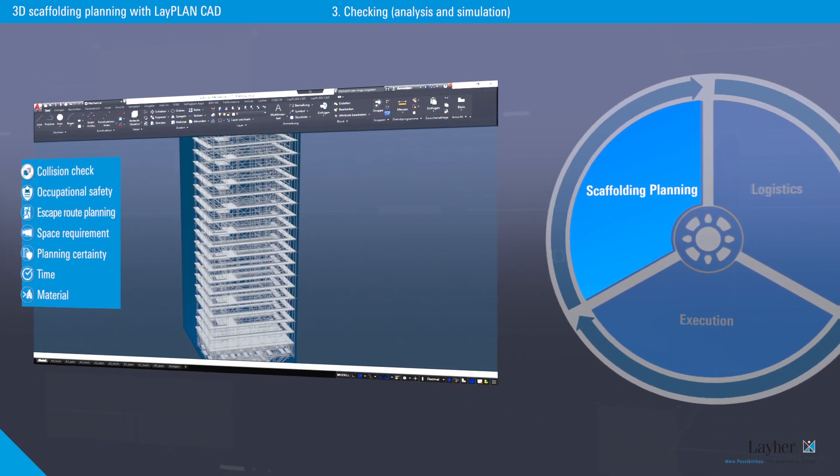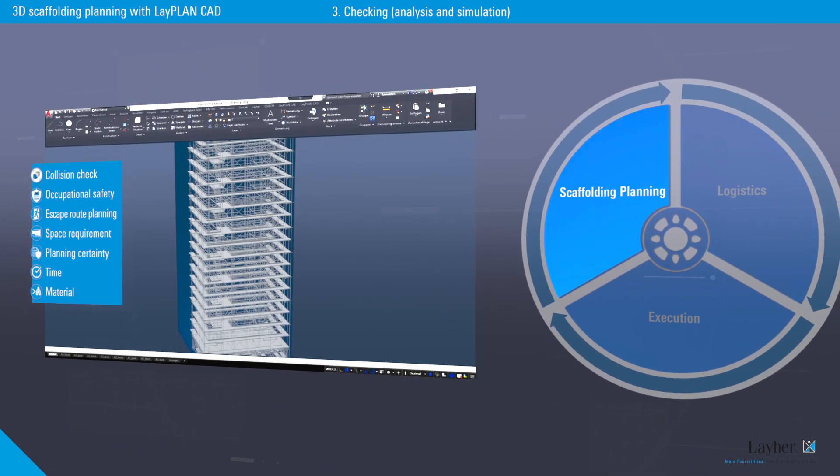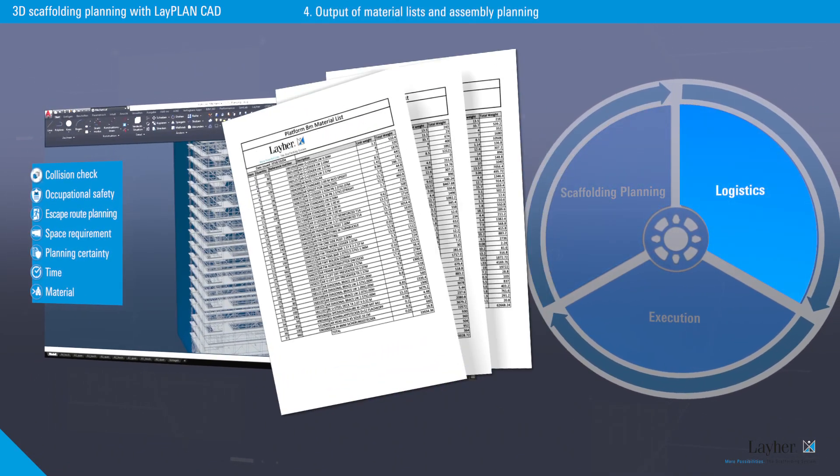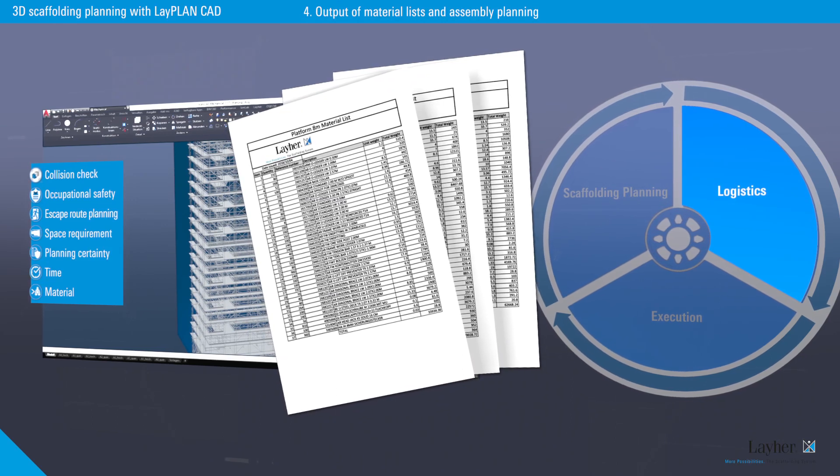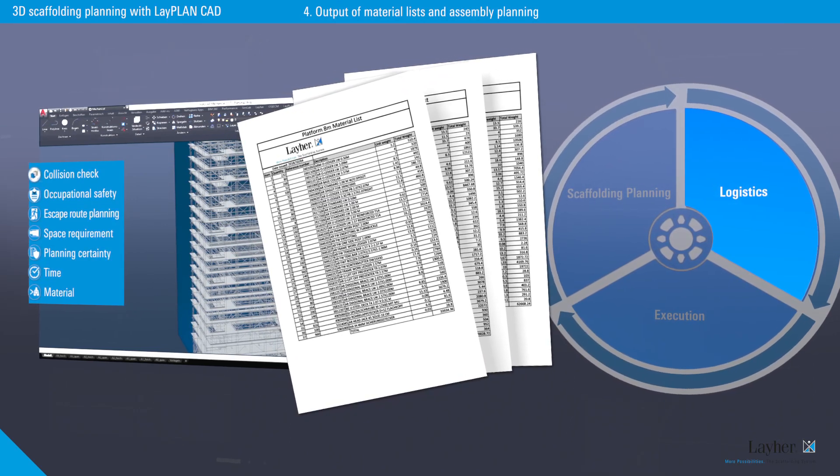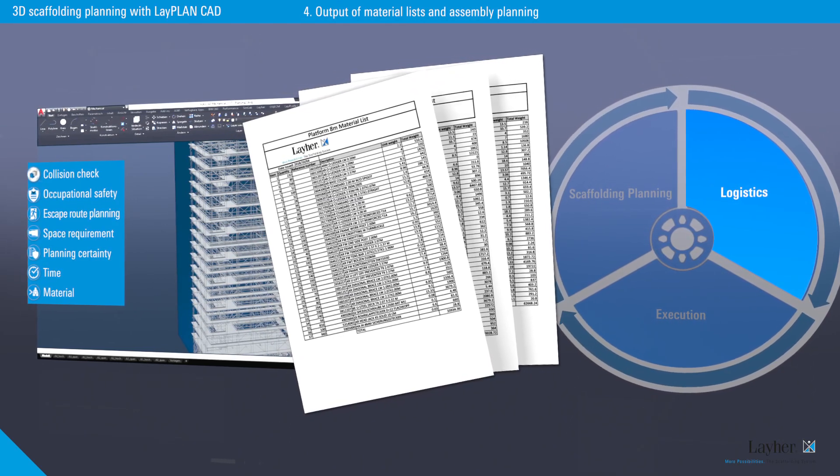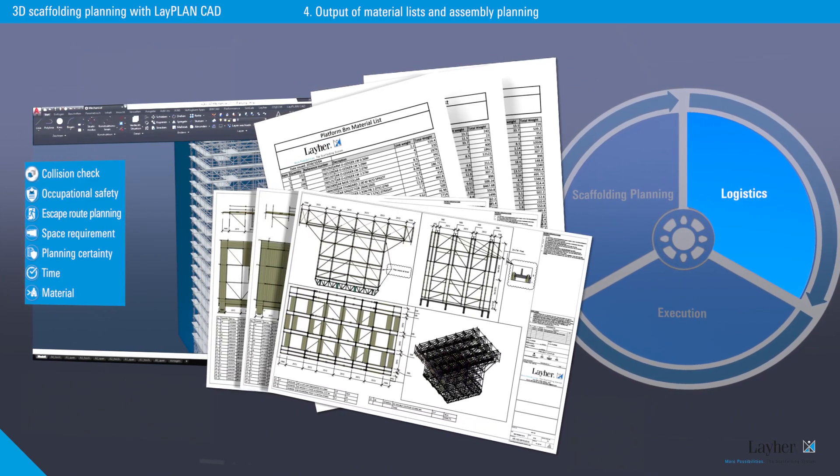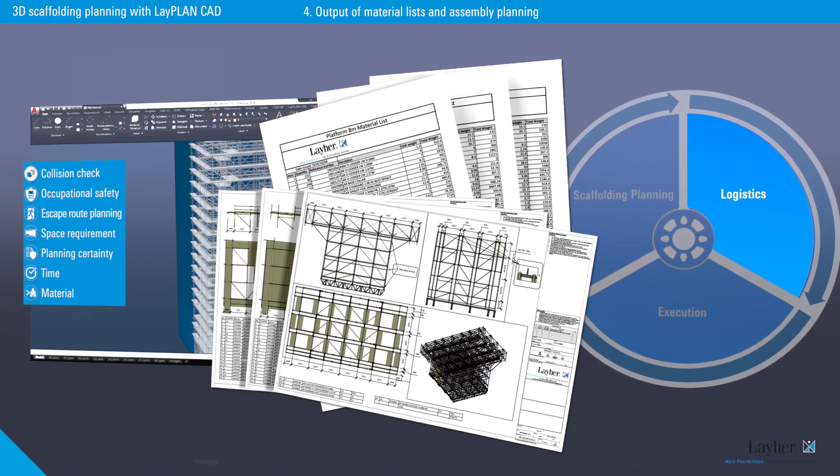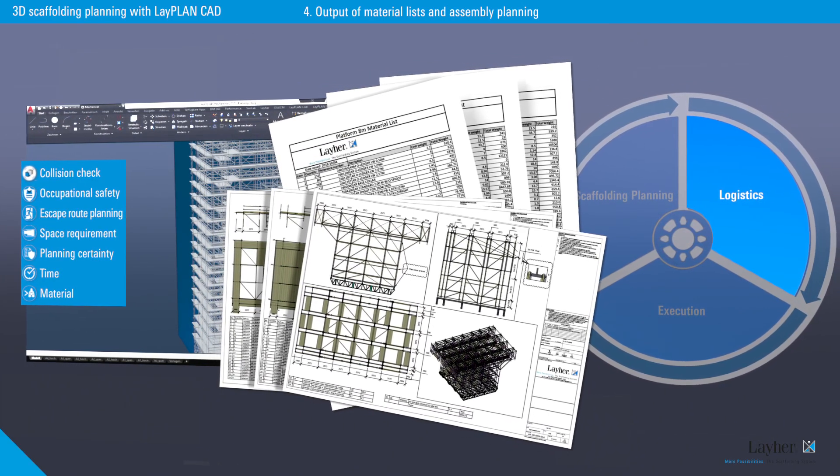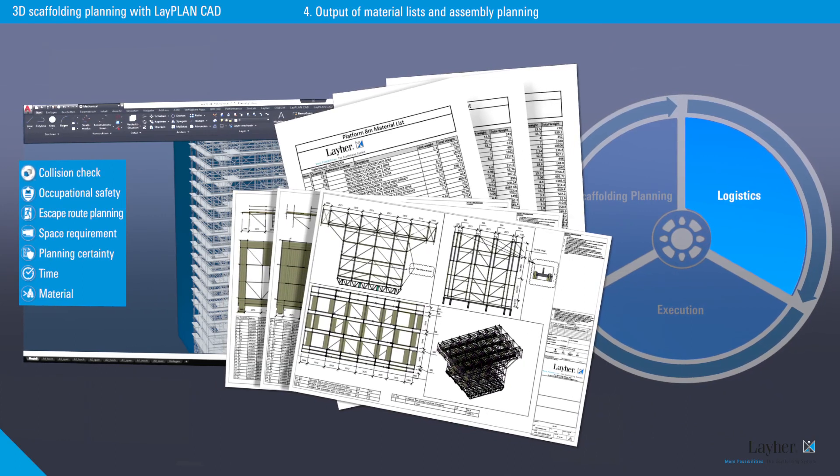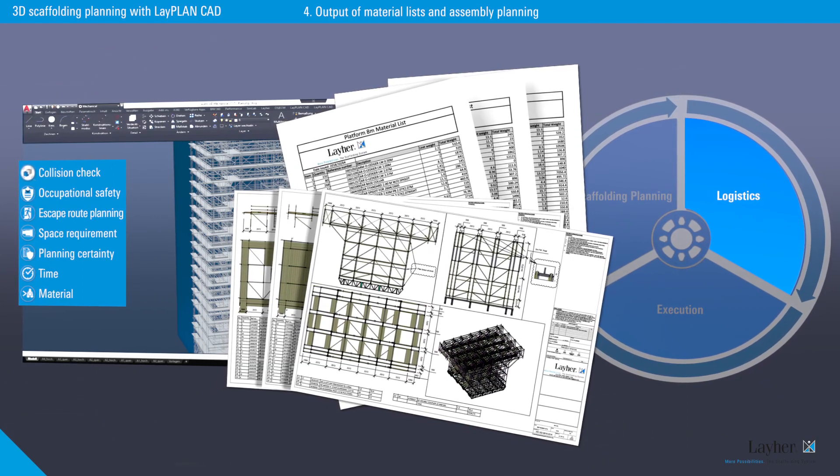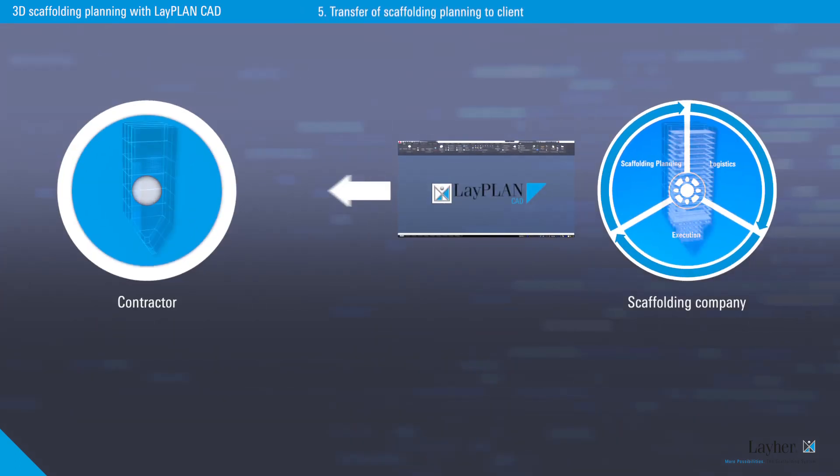What's more, less time and material needed for project implementation. Once the design is completed, the program creates material lists and assists in the creation of assembly plans. And in so doing, optimizes the logistics. Because only material which is actually installed is loaded up and transported.